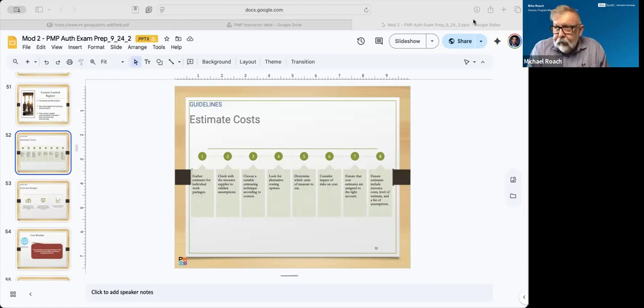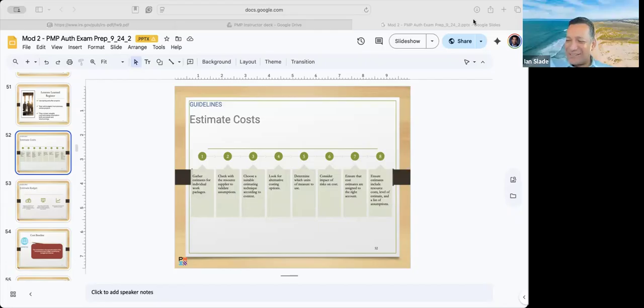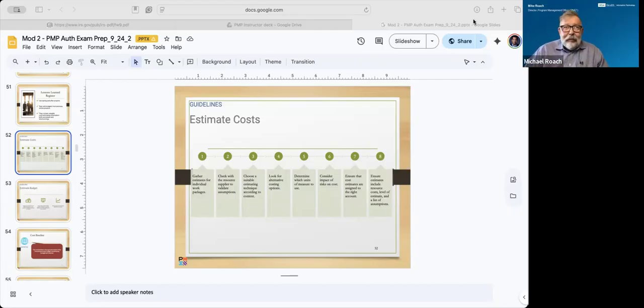Yeah, during the course of these long projects, small changes in prices can either bust your budget or surprisingly give you some slack in your budget to do something nicer. Usually it's the former, not the latter. Then you have to cut something late. You might have the budget or plan to do some beautiful art piece in the middle of a quad or something, and that would have to be rethought as you got further along. But yes, there are constant teams of people doing that on those large projects.